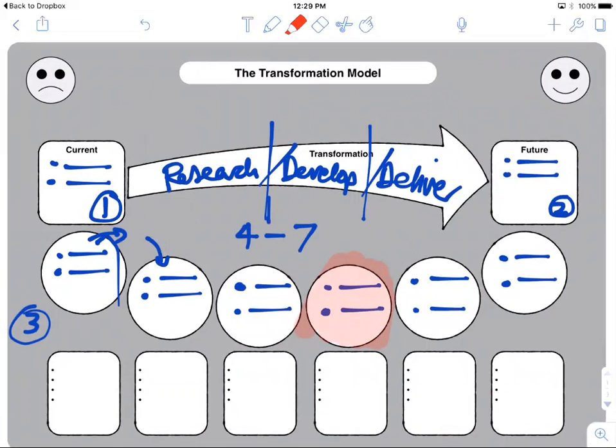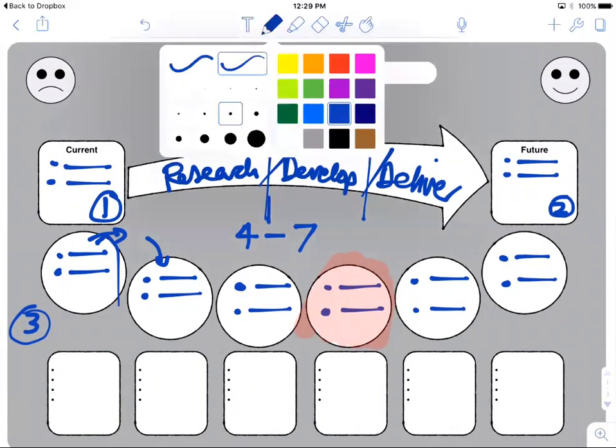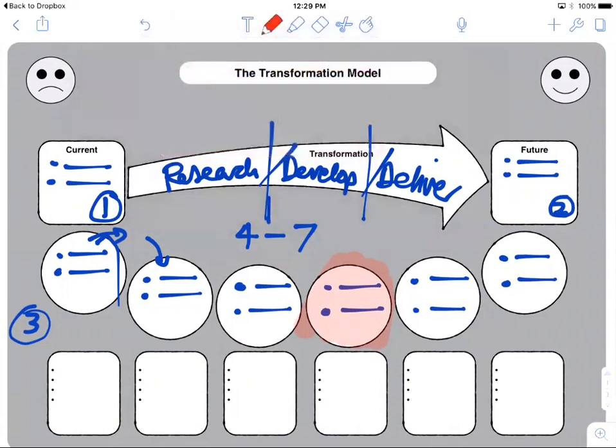And if the answer is no, then it is definitely a milestone at that level. If the answer is yes, then that is not really a milestone. It's an action or activity below a milestone somewhere else in the transformation diagram. The second test is to step back from the milestone and look at it and actually work through the process and say,